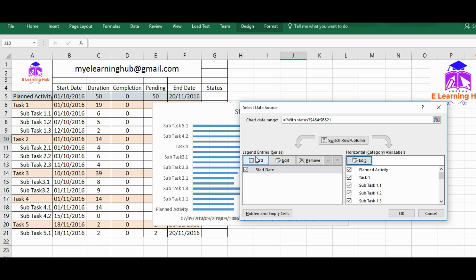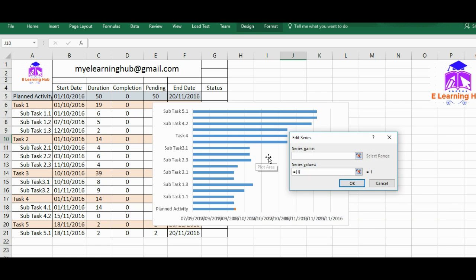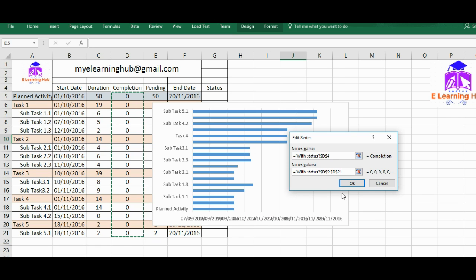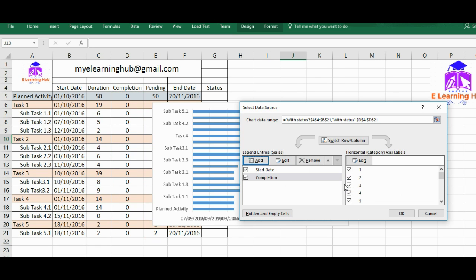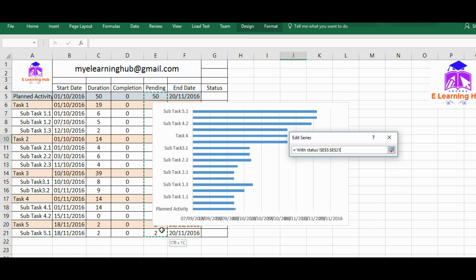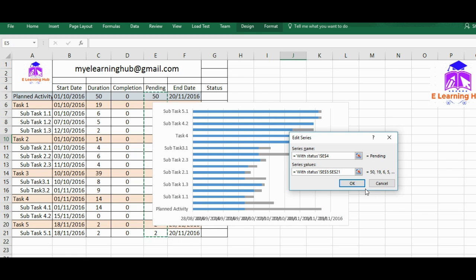Now instead of adding directly duration, which will give me the overall Gantt chart, I will add another series, that's the completion, so that we can shade them in other colors. And then we'll add one more, that's pending, so that we can shade them in some other colors. So that it will be giving us the output that's required by us.